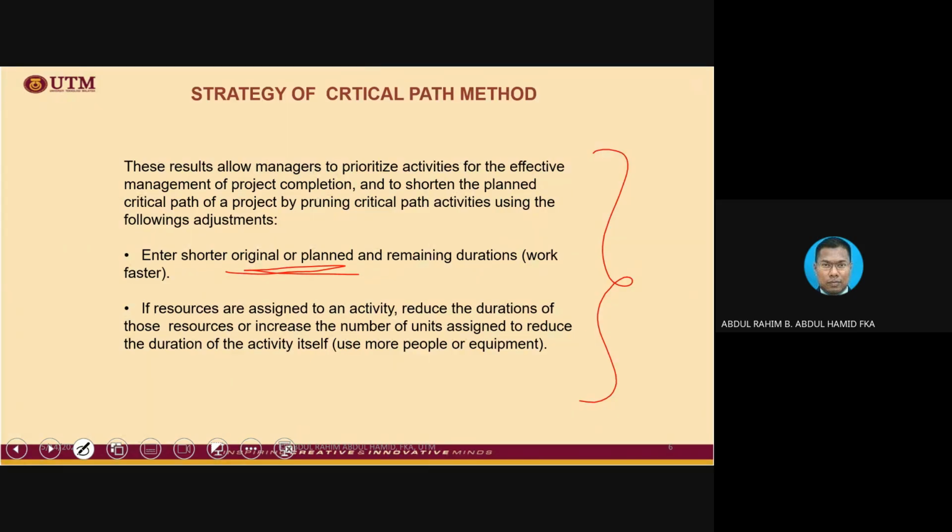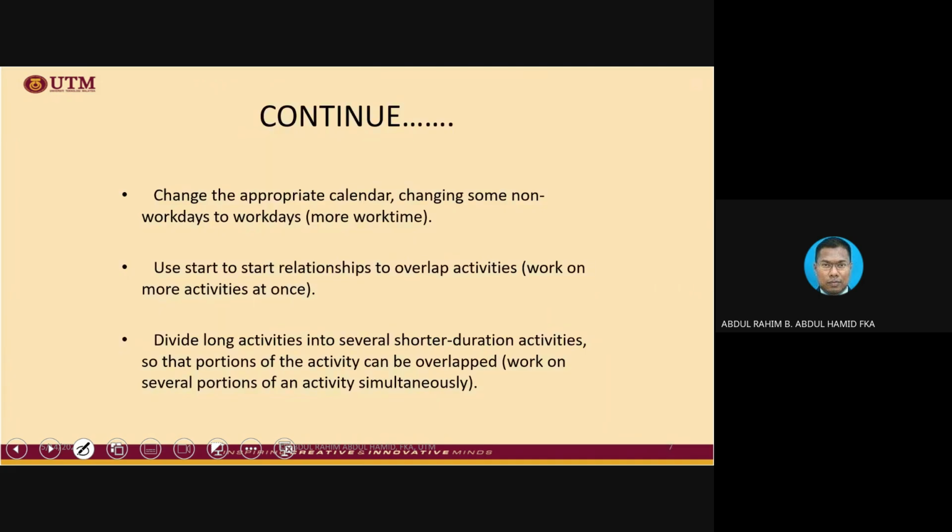It could be manpower, it could be machines. We can use technology, precast concrete, for instance, or IBS, that we can quickly install. We can even change the calendar. Instead of 5 working days per week, why don't we add one more day? For instance, Saturday is a working day as well. If we are really running short of time, even people will work on Sunday.